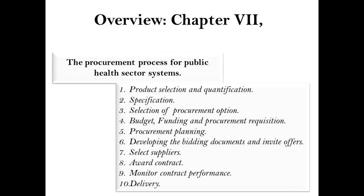Step 1: Product Selection and Quantification. Step 2: Specification. Step 3: Selection of Procurement Option. Step 4: Budget, Funding and Procurement Requisition. Step 5: Procurement Planning.